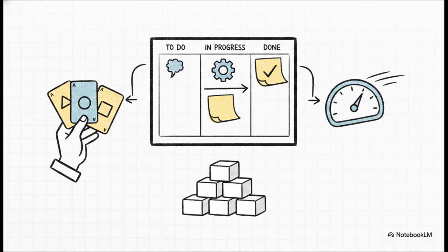To make all of that happen seamlessly, the team leverages specific tools and techniques. We're talking about platforms like Jira and Trello to manage both the product and sprint backlogs right on task boards. And to forecast when things will actually get done, teams use estimation techniques like assigning story points. They often use a surprisingly fun game called planning poker for this, and then they track their overall team velocity. This constant backlog grooming ensures that user stories, which capture the who, what, and why of any new feature, are totally ready to go when the next sprint rolls around.